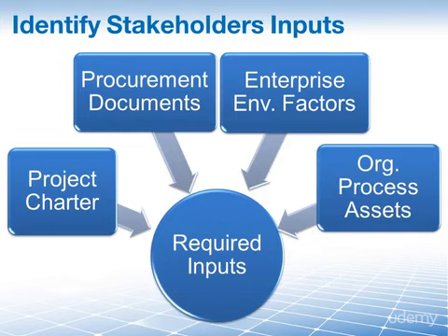Lastly, we can rely on our organizational process assets. Similar projects may have been done in the past, so there may be stakeholder registers from these old projects that we can look through. And that's all there really is to say about these inputs. There are only a few of them, and they help us to find and know our stakeholders.